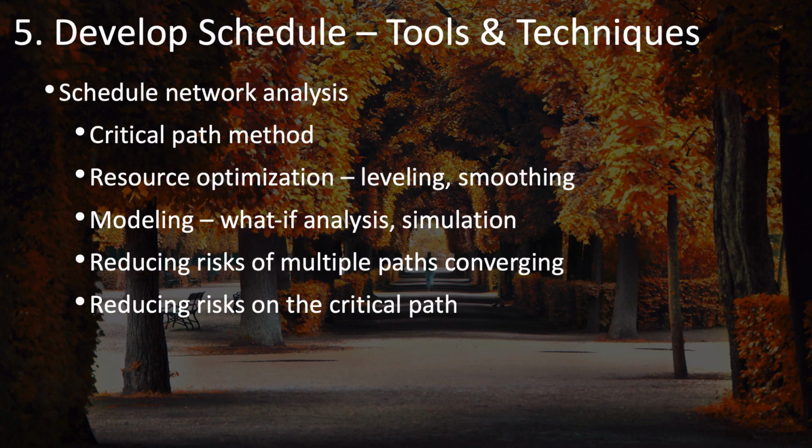When you have something like that going on, you want to try and avoid slippage by looking at the preceding activities in the schedule, and see what you can do to avoid problems such as the student syndrome or Parkinson's law. Try and get those activities done early rather than letting them run until their scheduled due date. That way, if you can get them done early, you reduce the risk that any one of those will delay that task that all of these others converge into.